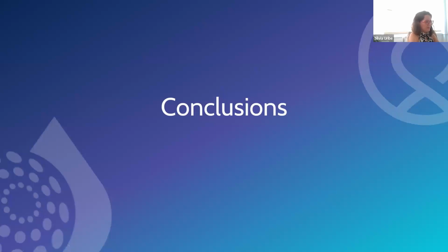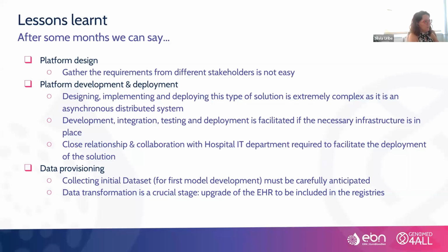Okay, so thank you very much, Davide and Vincent. Once we have presented the main objectives and also the general approach of the GenoMed4All federated learning platform, we would like to share with you some lessons learned that we have from these months of work. One of the main lessons learned is that gathering requirements from the different stakeholders is not a simple task. In this environment, we have several different kinds of stakeholders with different knowledge. So it's very important to bridge the gap between the technical expertise that we have and the domain-specific knowledge of the clinicians and so on.